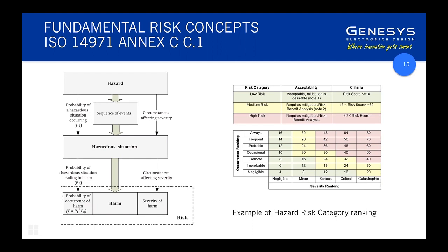I think in the beginning of the process, you can spend a lot of time trying to invent numbers for a probability of occurrence. Sometimes it's more useful to just focus on getting the severity sorted out. That can be a good guide to help you prioritize your highest risk items as a starting point. I'd like to give it a bit of a sanity check.